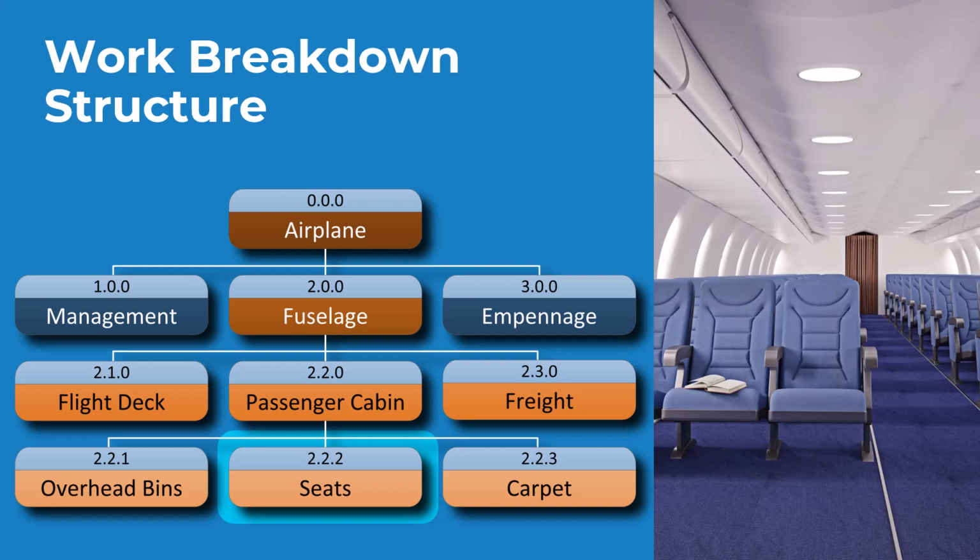There are about a dozen seat configurations in a plane, and each seat has a couple of hundred functional requirements. The seating experts can tell us if this is actually low enough, or whether we need to decompose the project more, say into safety, electronics, ergonomics, fixtures, and the like. If that is the case, then the seats may be considered just another planning package that we are going to need to decompose even further.